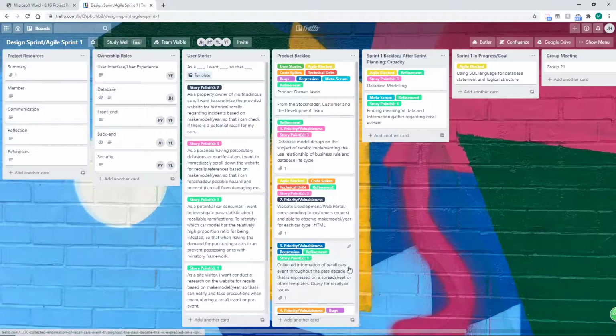And now the sprint backlog: we have to implement the first three, or choose one of them, in our sprint backlog for the first sprint week. For the sprint one backlog, you can see we do database modeling, story points 3. For each sprint there's a capacity for story points. I think 4 is the perfect capacity for each sprint. So story points 3, and the story points add up to 4. That is how much effort we're going to take to bring those product backlog items to completion.